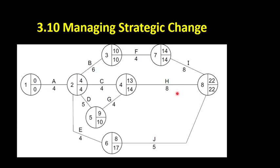The critical path in this example is the one where all the numbers are the same. This implies there is no float time between the earliest time that this could start and the latest time it could finish. In other words, you've got to do these activities where the numbers are the same in order for the project overall not to be delayed. So that's the critical path — in this case, A, B, F, I.